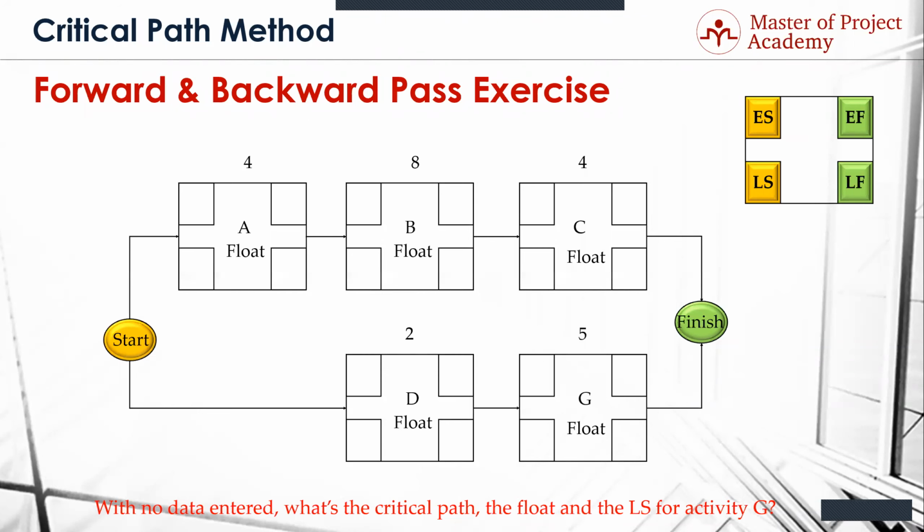Yes. Okay. All right. So what we're going to do is walk through this. So Dave, give me the first one. What do we got? What's our first two variables? Early start, early finish for A. That's going to be 0 for early start and 4 for early finish. Okay. And Norvin? B? 4 for early start and 12. Okay. And then we move forward. Tatiana, C? 12 and 16. And that's the forward pass on the top half.